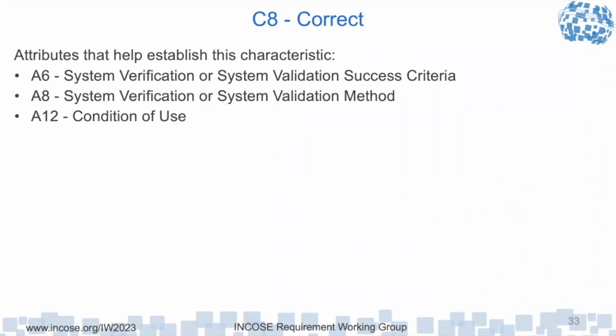Yeah, and I've also got a plan for each one of those, how you're going to verify that the system has met those, and you have to define the individual criteria. And so, unless I state that as individual requirements, I'm not going to have those defined. And also, it wouldn't be a bad idea if you could explain the rank for each one also, and have the traceability to make sure each one really is needed. A little change of thought. I've taught classes that's how you do it, and now I'm finding out maybe that wasn't the best way to do it. Well, I 100% agree with that.